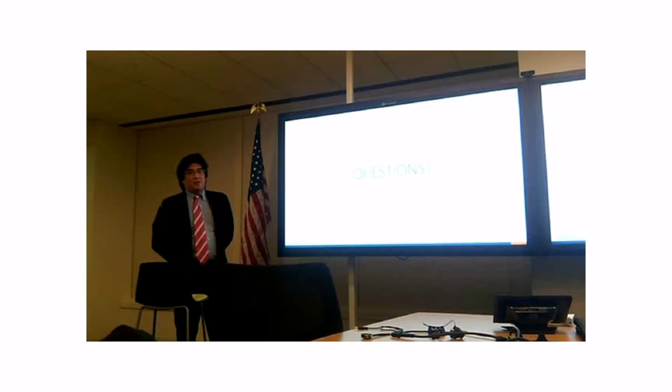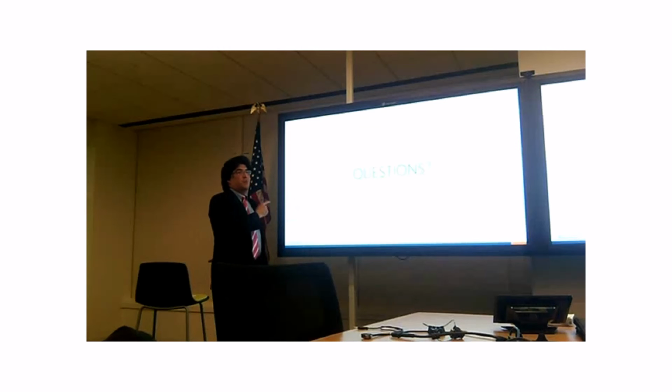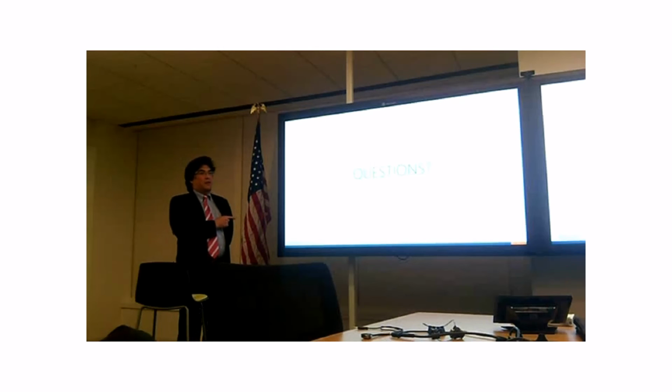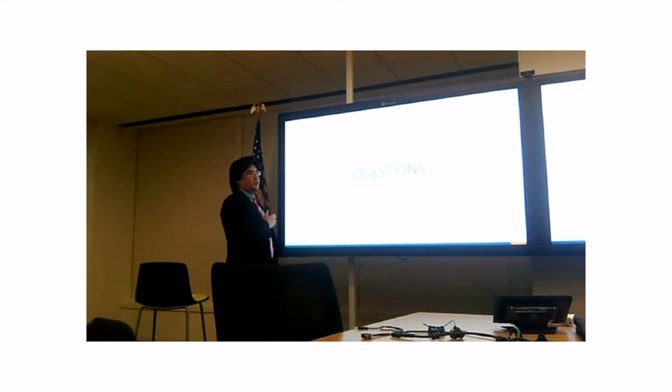The other thing is that we have calculated training in here. What's surprising is that it tends to be pushed back towards year three or year four, and that has a big effect on the benefits. So all of the benefits of people using the system as they should are not realized as one would expect. If the training numbers start to come in earlier, you start to see that.